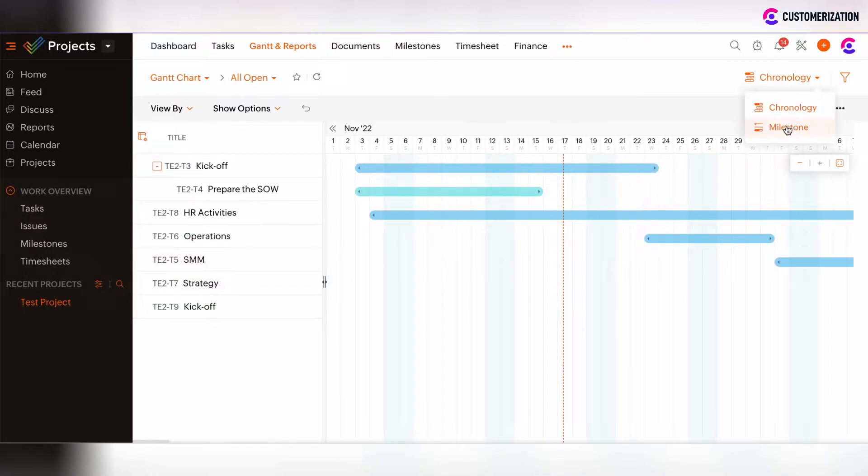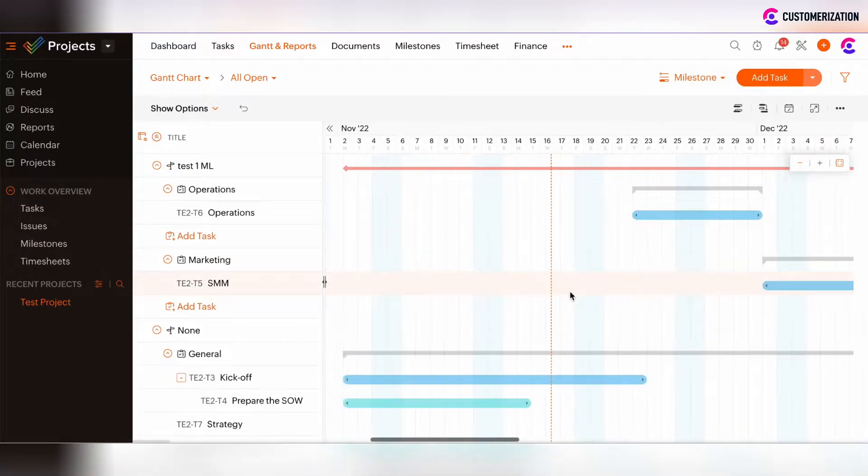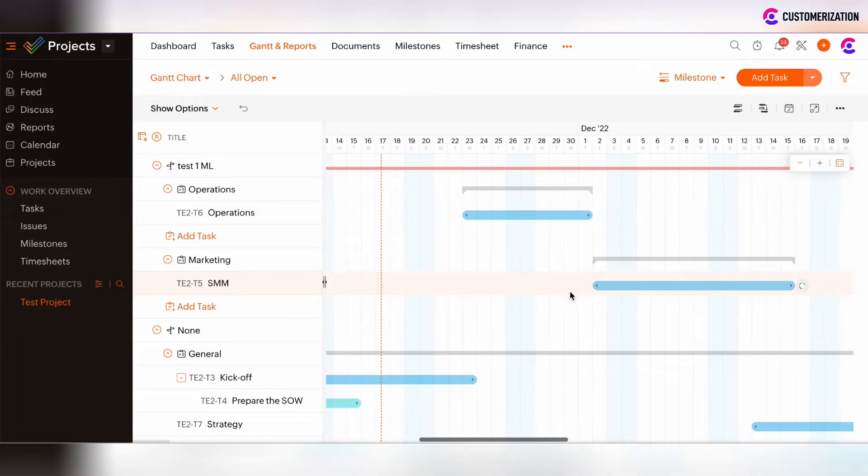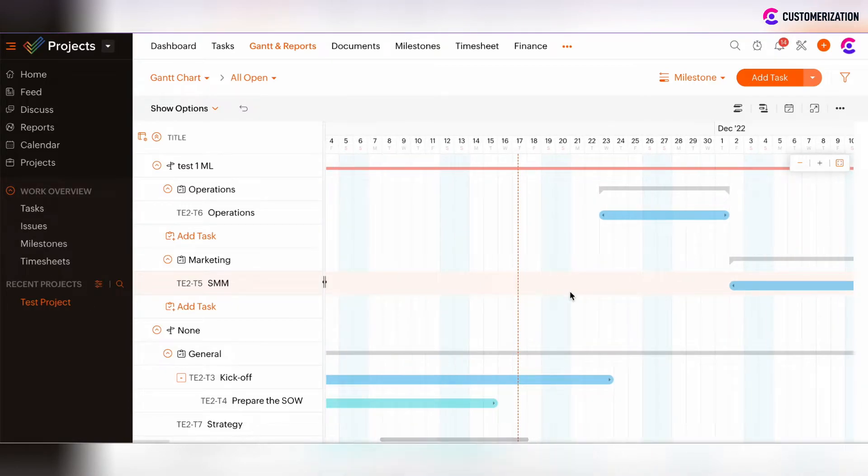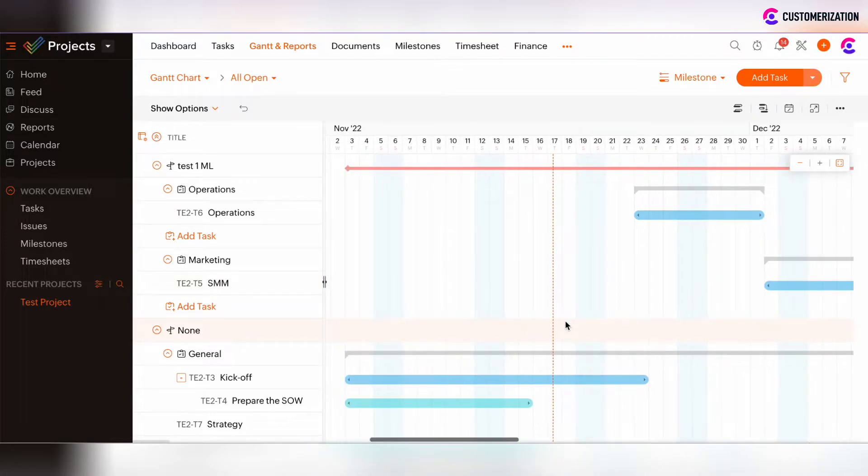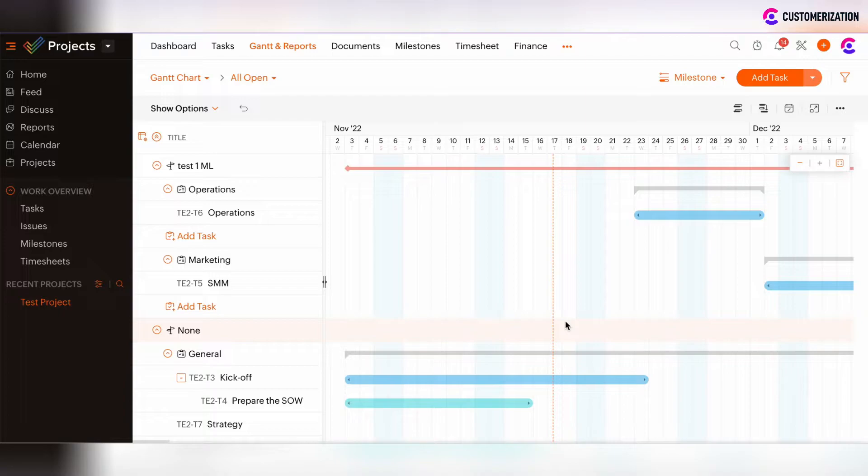Moving back to Milestone view, there is also the possibility to set the task dependencies. And there are two types of dependencies: Predecessor tasks and successor tasks. Predecessor tasks are the tasks which should be done first. And then successor task is the task that can be started only after a predecessor task is completed.